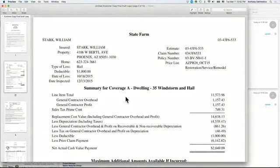After the initial adjustment, the customer receives their first ACV check, typically about half the price of the project. At this point, you'll need to go back and formally contract the job. This is typically when you're going to get the first set of approved insurance paperwork, and oftentimes when you need to rewrite the estimate and send in a supplement to the insurance company for missing or incorrect items that you're going to find. In the next chapter, we're going to analyze and discuss insurance paperwork. See you soon.